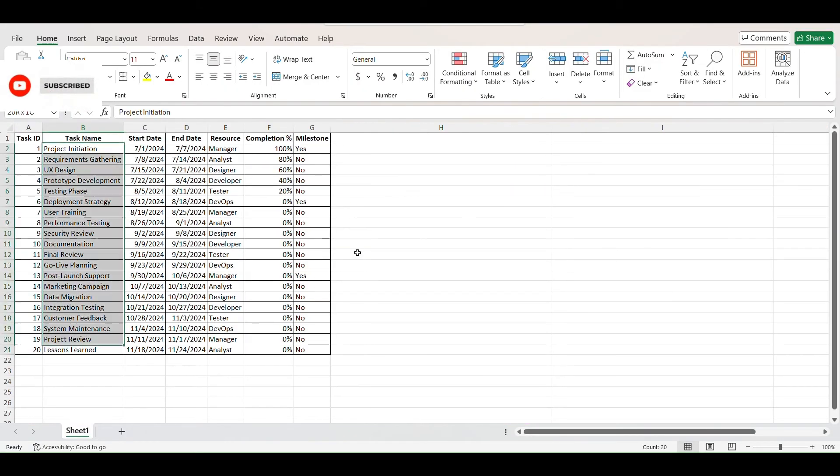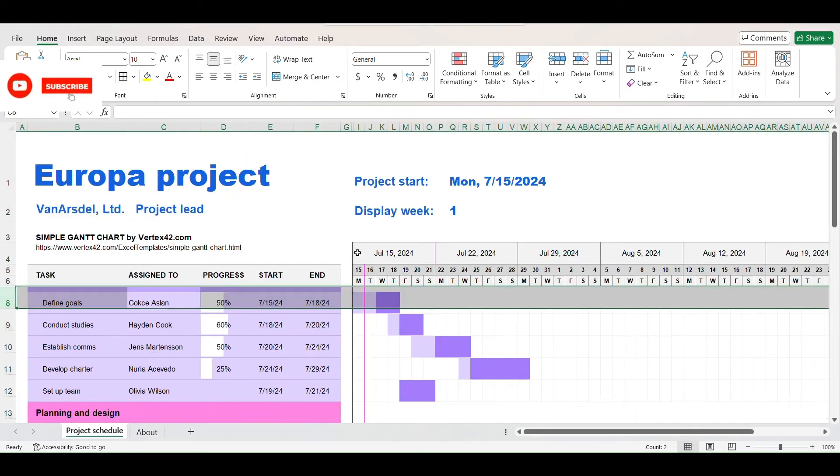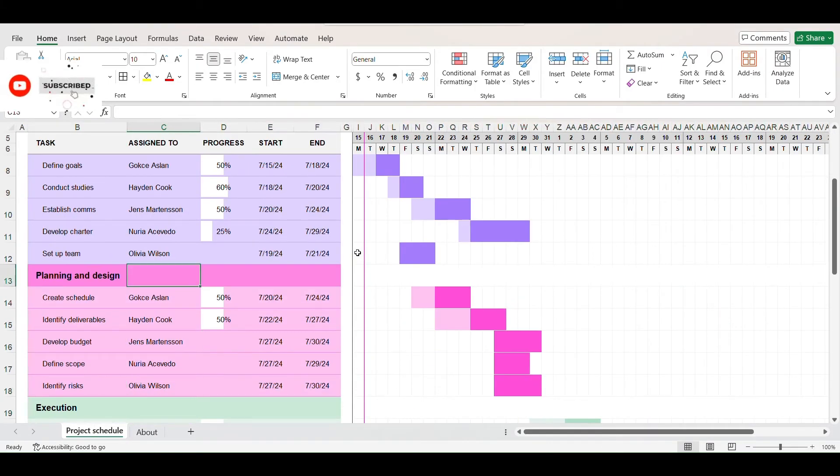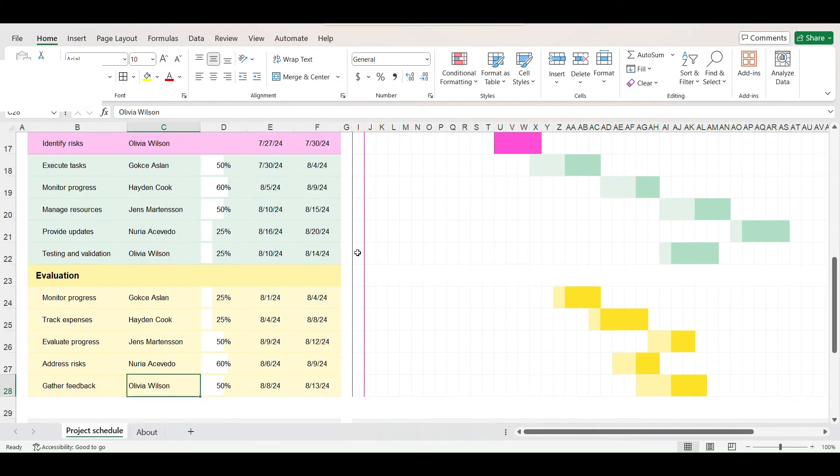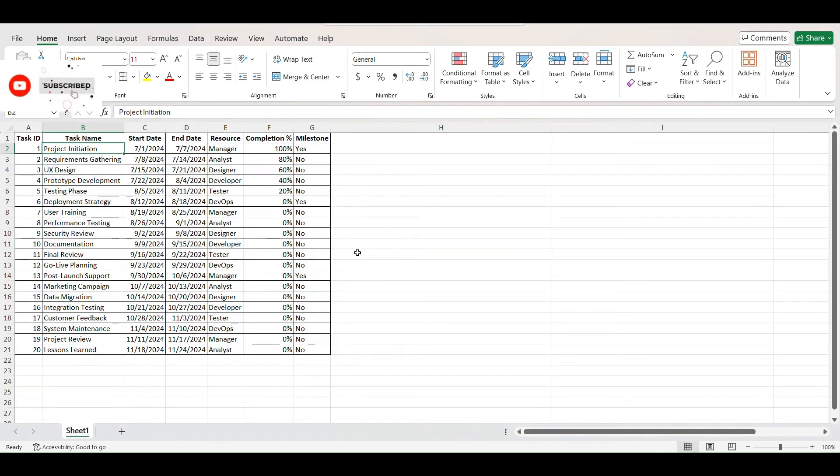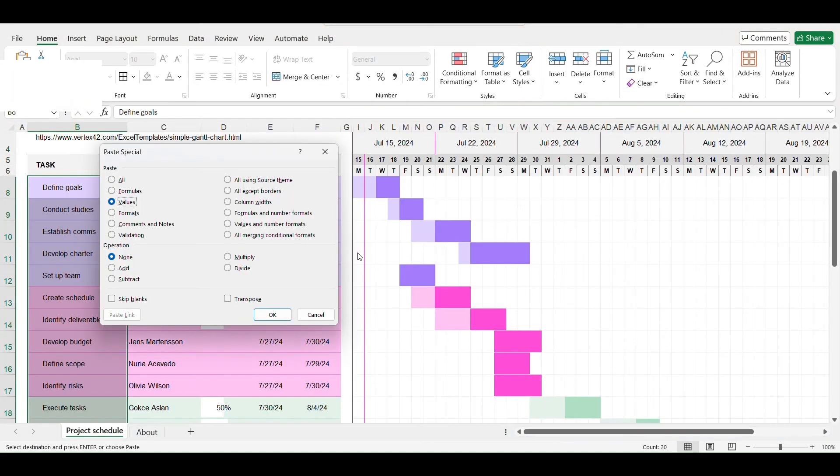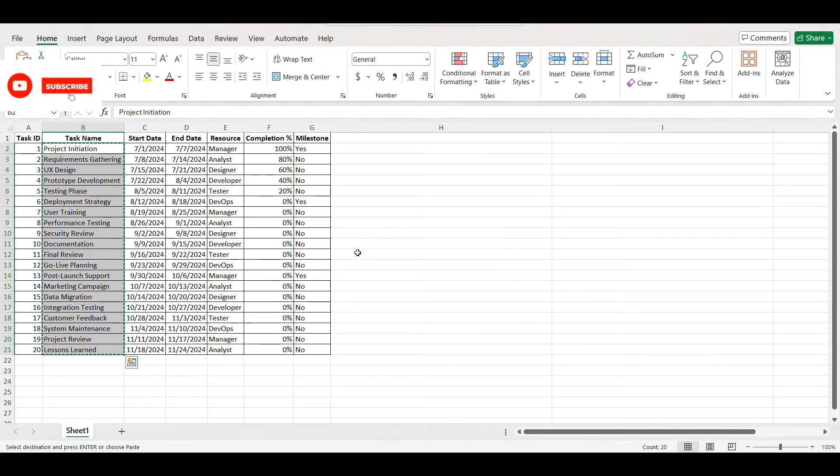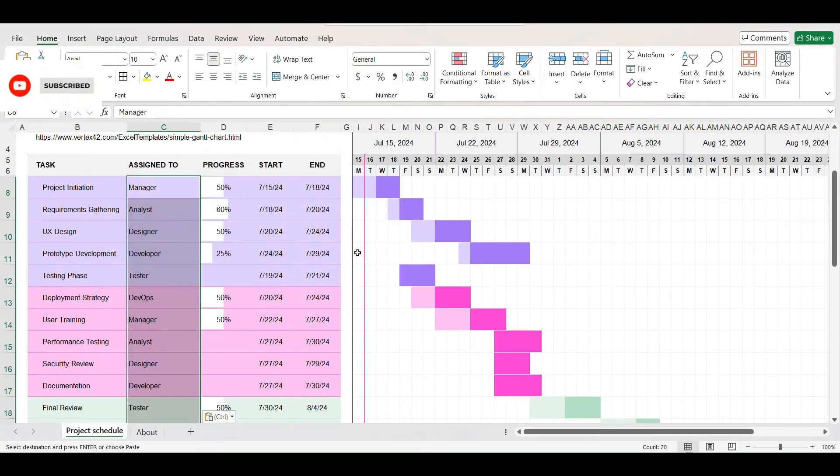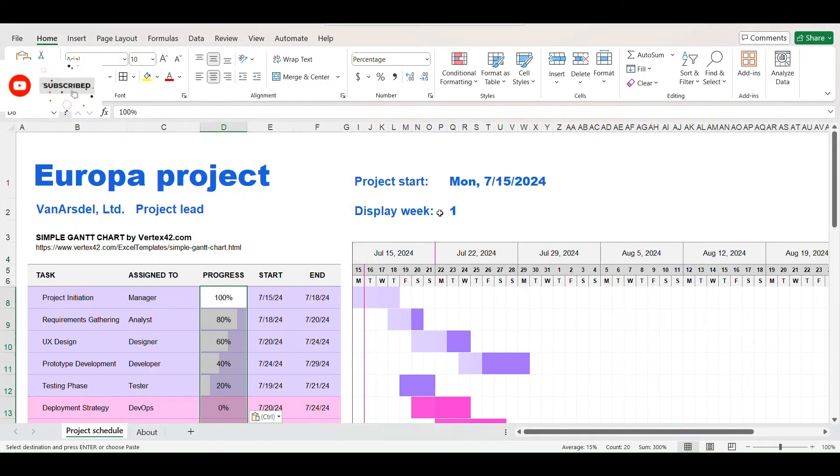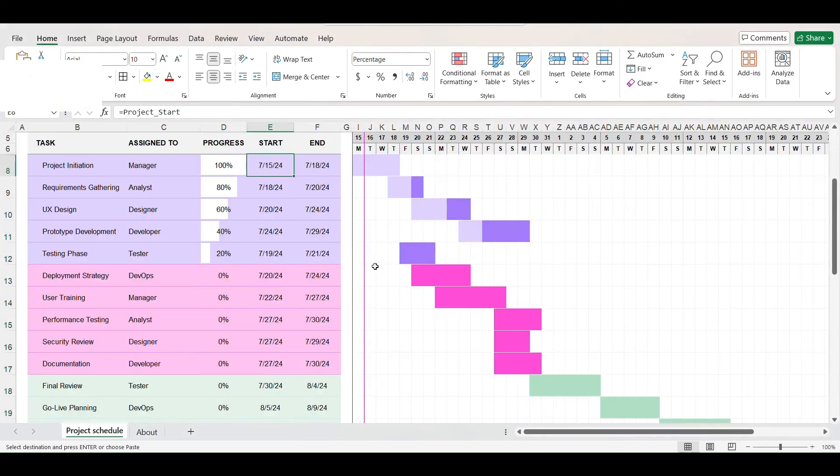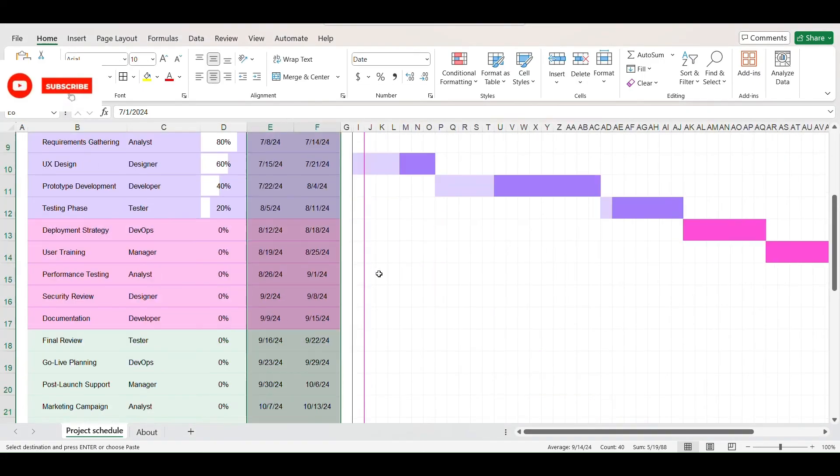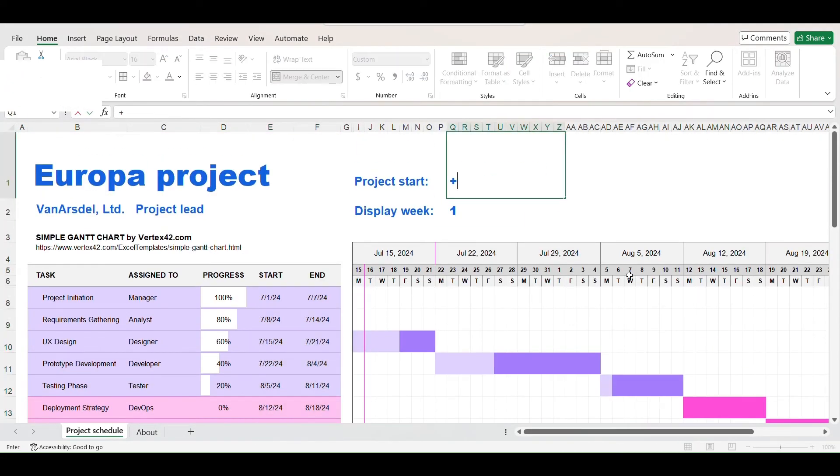Now just copy paste the data into the template after making necessary adjustments. Change project start date to the start date of first task.